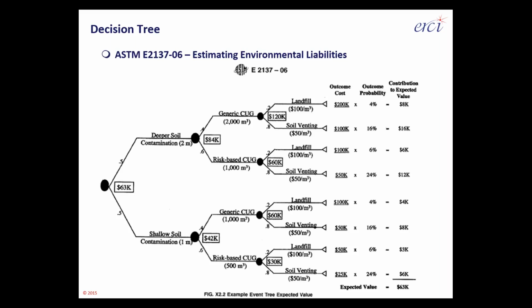The next breakdown in the decision tree, moving left to right, is whether to send the soil to a landfill at a higher cost or soil vent the contamination on-site at a lower cost. And from there, the calculations are done.